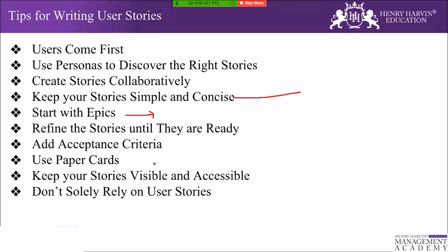Starting with the epic allows you to sketch the product functionality without committing to the detail. This is particularly helpful for describing new products and new features. It allows you to capture the rough scope, and it buys you time to learn more about how to best address the needs of the user. It also reduces the time and effort required to integrate new insight. If you have many detailed stories in the product backlog, then it is often tricky and time consuming to relate the feedback to the appropriate item, and it carries the risk of introducing inconsistencies.